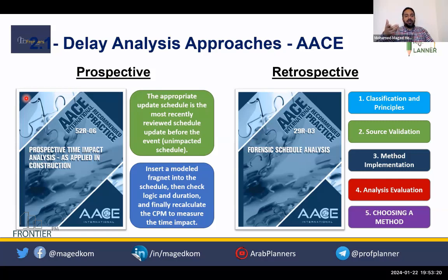And as you started the work, if they gave you access and you started the work until they send a notice to proceed, you need to check from when you calculate the commencement date and the project duration, the time for completion. And also, if it will be calculated from the notice to proceed, then the project duration is extended.